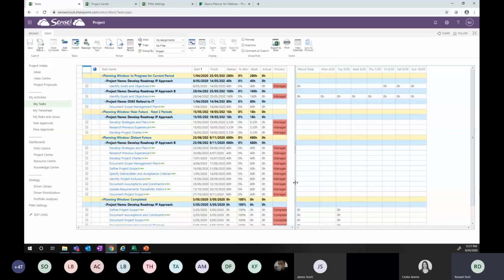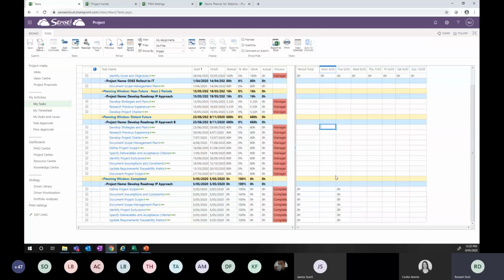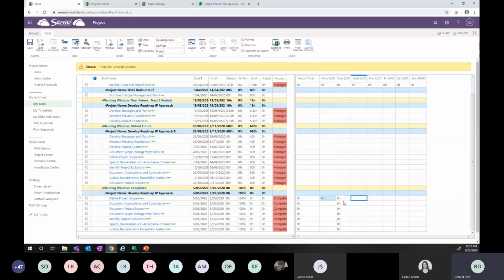And this is where the entire tasks/schedule picture links in. As a result of publishing those tasks assigned to myself, I have visibility of what's assigned to me, and rather than going into timesheeting, I can actually go in and provide individual task updates. For example, I don't quite have anything happening this week, but what I can do is I can go into this particular picture and I can say that I've actually done 4 hours of work in here.